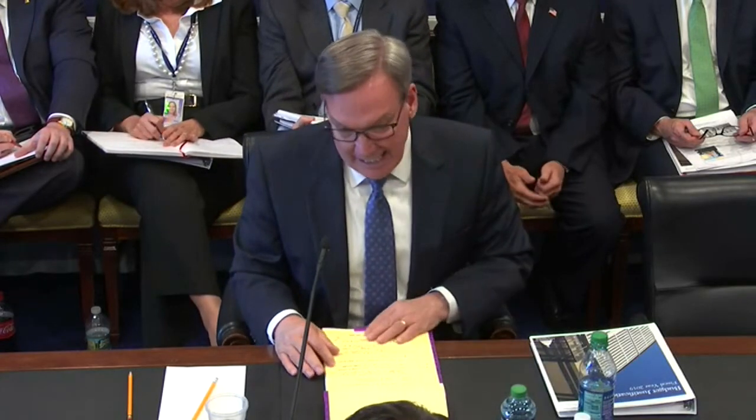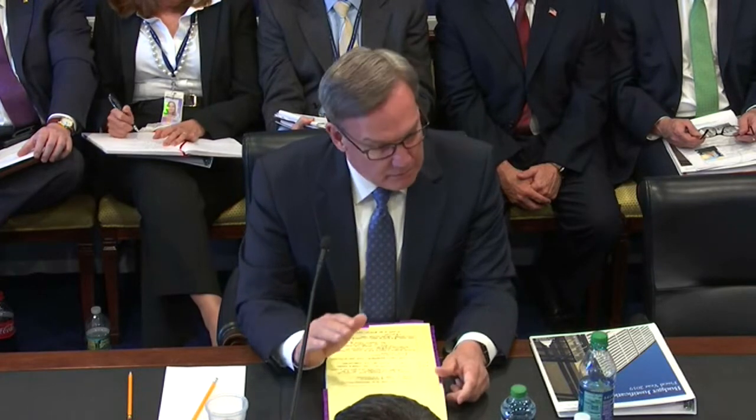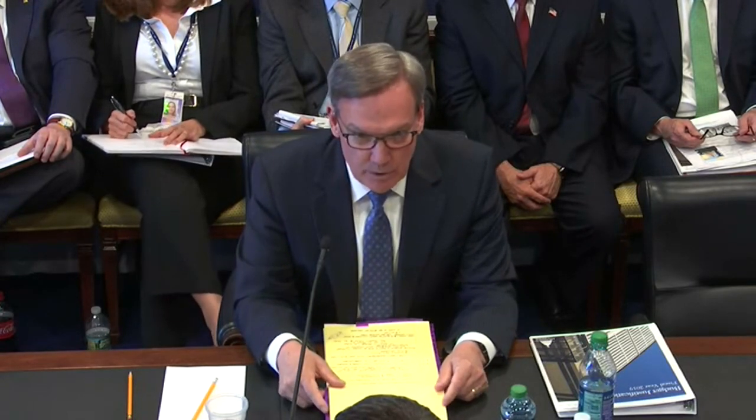So we're working towards that date. Obviously, this is a pretty high-risk project for us. You know, we developed a cost estimate and provided that $15 million estimate before we had design documents even started. So we're putting forth a great deal of effort to manage it day to day, to keep costs under control. We're pretty comfortable with that November date. We're a little less comfortable with the number, but we're working hard to keep costs as contained as we possibly can.